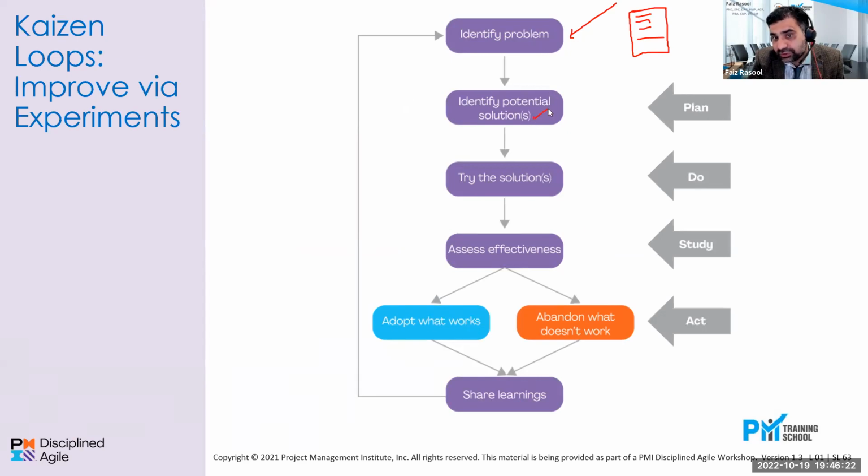And here they are saying it's a good approach to have more than one potential solution. We call it set-based design. Engineering people are well aware of set-based design. Okay, where instead of going for just one solution and considering it would be working, we go for a set of solutions so that we can try those solutions and see which works the best. Okay, maybe instead of this one or this one, this is the right solution.